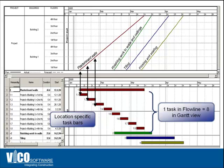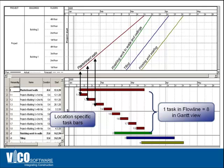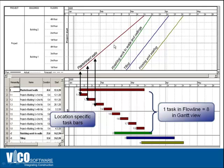In the flowline view however, you only have one line that represents one crew, the drywall crew, across several locations. So instead of eight tasks, you only have one that you will need to manipulate and define. You also with this technology reduce the number of links that you embed into the schedule because the location sequence, the location logic, is automatically generated and controlled by the flowline view.